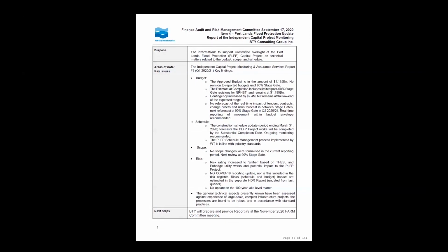At the moment we've got probably in the order of 60% of the construction contracts awarded, which means we've probably still got 40% of the work that needs to be permitted, including parks and the sediment management area. Bridges are fine. I think the Don roadway still needs to be approved. So there's still quite a number of permits that need to be obtained. We just want to see things continue as they have. So thank you. Absolutely.